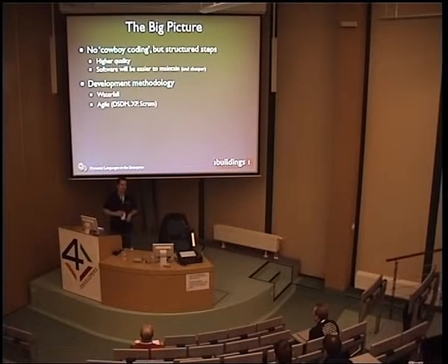Each cycle you just add features and you repeat the process. The big advantage is that you have earlier feedback from your customer. Instead of going back and developing something for 6 months and then presenting that to the customer and having the customer say, that's not really what I wanted, with agile development, each iteration, for example every week or every 2 weeks, you see all the features that you've added and you can get immediate feedback from the customer. So it's a lot more useful. Again, if you look up agile at Wikipedia or something, you'll get a lot of details on that and book recommendations.